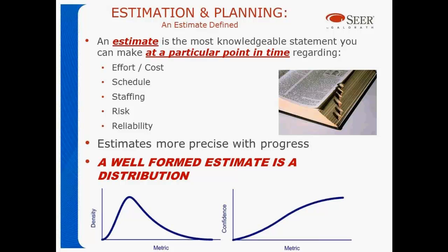While we're talking about HealthCare.gov, it's always important to talk about how we get into some of these things. We've heard of a number of technical problems, but a large part of the problem really is a planning problem. Now, I'm not saying they didn't plan correctly, but they probably didn't have a vision of what it was really going to take, how long it was going to take, how much risk there was in it. Having a viable plan up front is one of the big lessons learned. Additionally, we believe every estimate should be a probability distribution. There may be a 50% probability something can be done in 3 years, but a 90% probability might take 4. We'll talk about that in more detail in a minute. Next slide, Lee.